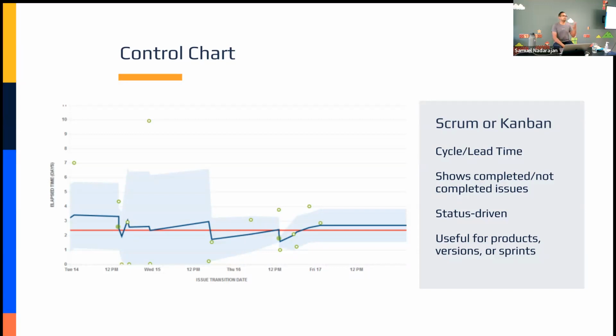So let's take, for example, we know that in our prioritization and planning activities, we may stand up and create a bunch of stories and tasks to complete. Lead time would start counting the clock from when that ticket is first created to when it moves through your middle columns. So going back to that board visual, lead time would include not just your middle columns, but it would include that leftmost column as well.